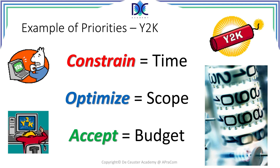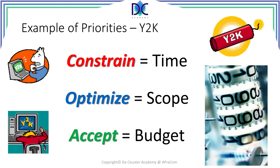The second parameter was to optimize the scope. Distinctions were made between very important items to correct and small things that could be neglected, but the main things had to be resolved. The last parameter — budget — was accepted. A lot of money was spent, and many people say it was too expensive, but nobody would take the risk to go back to the old programs. A similar project was the introduction of the Euro, where everything had to start on January 1st, the first minute after midnight, with all ATMs across the entire Eurozone switching to Euro. It was also a very complex project with the same time constraint.